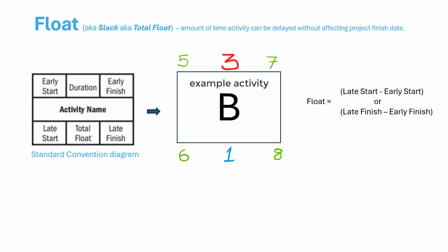That is the total float of this particular task. It has been delayed by 1 day. Then the late start becomes the 6th day. The beginning of the 5th day is the early start, and the beginning of the 6th day is the late start with a delay of 1 day. And if it starts on the 6th day, then it will proceed for 3 days. That is the entire 6th day, the entire 7th day, and the entire 8th day. And that's why we get the 8th day as the late finish with a duration of 3 days for the